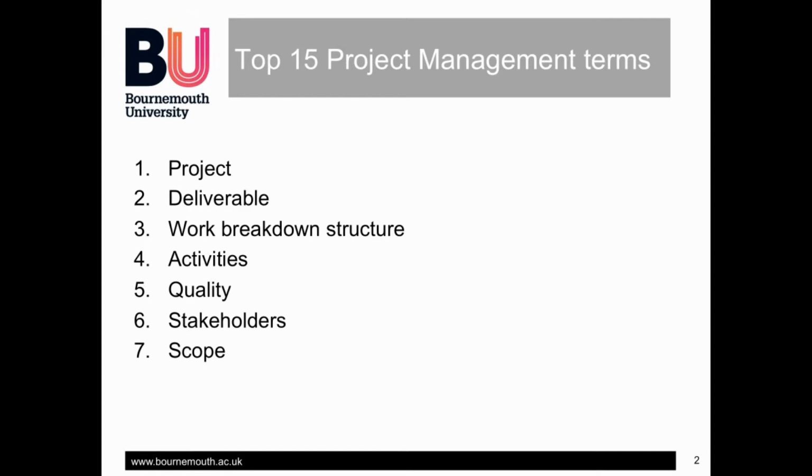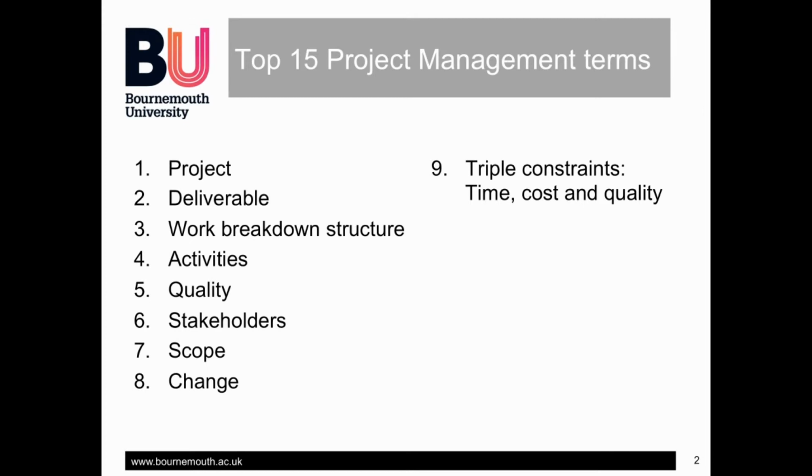One project management term you are sure to come across is change. In project management, change refers to any alteration to an agreed deliverable. A change in the party scenario might be that the intended venue is no longer available or the band has had to cancel. Whenever change occurs, it's a good idea to assess how the change impacts the project to help you to decide how best to react to the change and which stakeholders you need to involve. One way of assessing change is to consider the triple constraints of time, cost and quality.